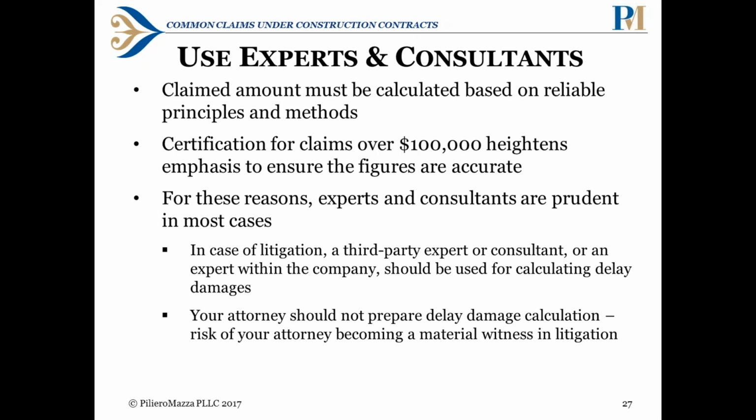Like we had a differing site conditions claim where the contractor found a lot of mold, and we had an expert that was a mold inspector who said, yeah, when you encounter this kind of mold, you do need to put up plastic sheeting, you do need to seal everything up, you do need the protective equipment. And that, once again, adds a voice of credibility and authority to your claim, and it's less of a he said, she said, because you're able to bring in a credentialed person to back up what you're saying.